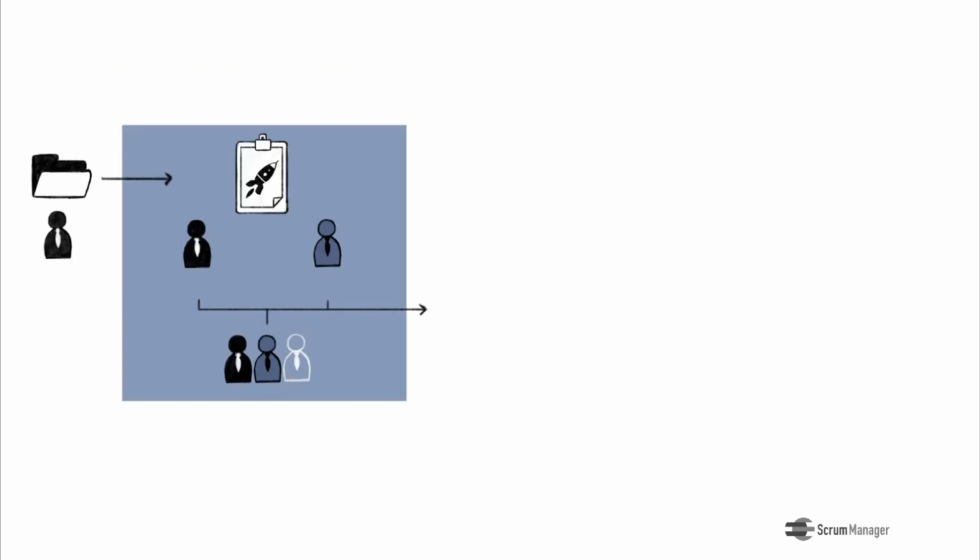And in this diagram we can see how Scrum works. It starts with the planning of the sprint, in which the team determines the part of the product backlog that will bring the most value to the customer. It can be done in a sprint at the same time. This way, it selects the stories from the product backlog that are to be developed first, and with them it determines the list of tasks that will form the sprint backlog.